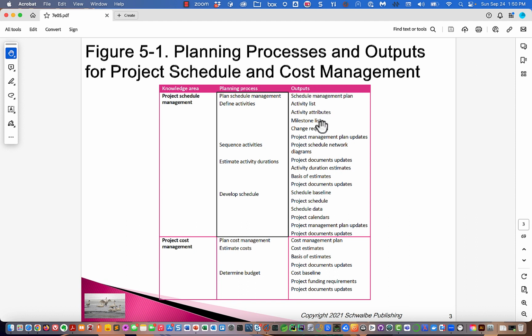We come up with them by brainstorming off of the WBS. Even though we said in the last chapter that a proper WBS doesn't include activities or tasks, that doesn't mean that we wouldn't use the WBS structure as a way to organize or brainstorm about activities or tasks. Once we've identified them all, we need to sequence them.